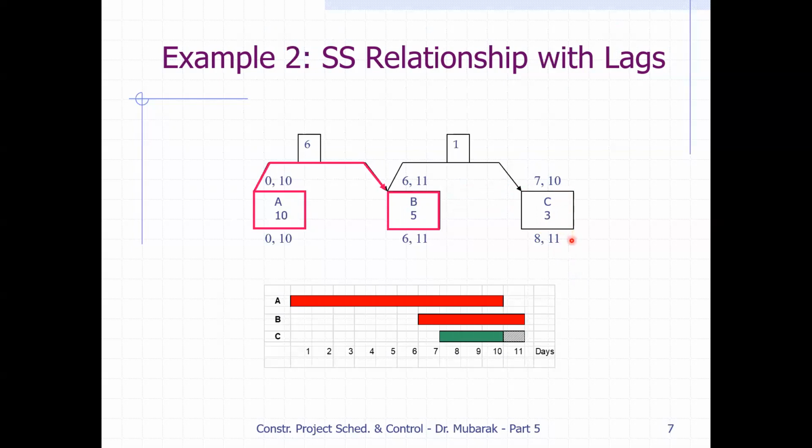Well, as you can see here, we have a critical activity, which is B, the sub-base. It's 11 days. So looking at this bar chart, the excavation lasts 10 days, and then your sub-base activity has 5 days here. And then it finishes on day 11, but laying the pipe actually finishes at day 10.